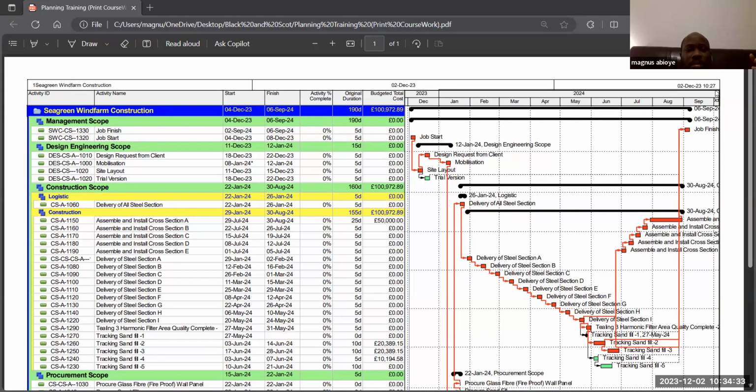So let me give this example: A, B, and C. There's a relationship between A and B to C. When I take away B, when I dissolve B, I'm also saying that once I click on this dissolve, A should link to C directly without me going to A and looking for C and linking them as a next action. And that's dissolve.